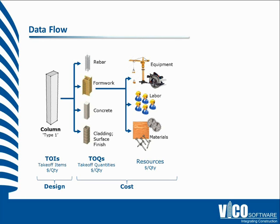Whenever the design is changed, the estimate will be updated. If the size of the columns changes, for example, the volume will flow through to formulas inside of the resource level, and that will be used to update the cost. So that represents the data flow we use to connect the model to cost, but not yet really to time.